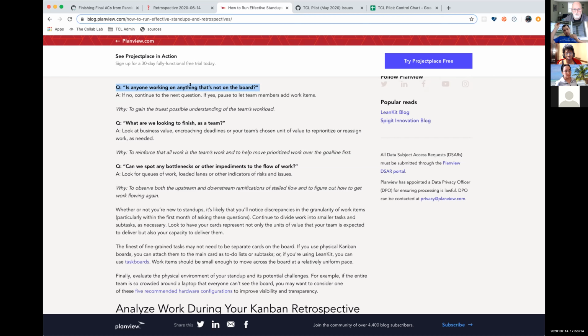We could time box it. A pair could take the spike for a week and see what it would take to implement the proxy in Netlify. Do some research, write up your findings, and make a recommendation at the end about whether we should or shouldn't do this. And if we do it, here are links to the documentation and here's the approach. And that could be a task on the board.